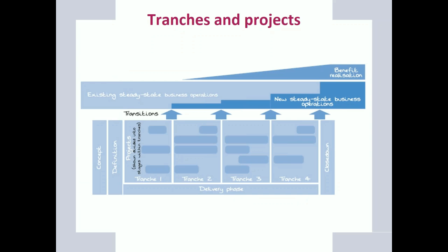The second piece then I want to move on to here is the concept of tranches. In most cases, most programs are designed so that they aim to deliver quick wins early. Most of you will have heard of that phrase. Programs that run for many, many years and deliver nothing run a huge risk of losing their audience because there is no confidence of the benefits yet to come. Most good programs are therefore organized into tranches, where the difference between the tranches is a matter of timing, and it's associated with releasing into the business some benefits early.